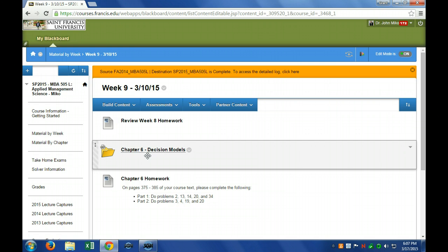So for this project, we want to determine the best case, when this project is going to be done. We want to determine the critical path, the activities with no slack. And by building the variability into every task, we build in variability to the whole project. So now when I tell my boss it's going to be done in 100 days, we're not going to say 100 days, we're going to say 100 days with a standard deviation of 10.